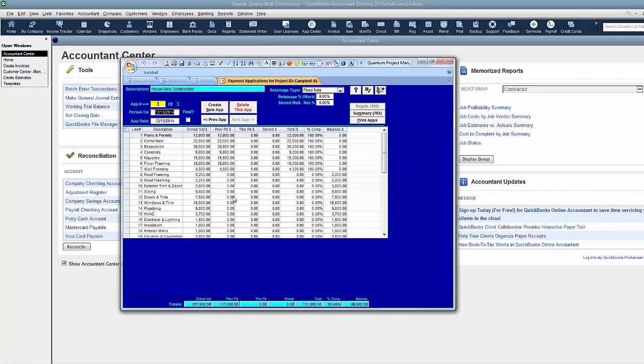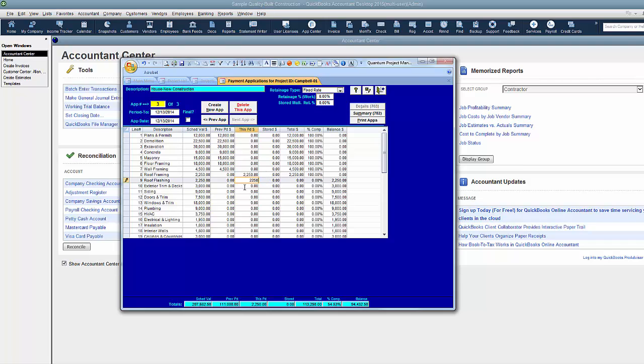And now it's asking me what we're paying in this application. So, let's say we're paying all of this one, all of this one, and maybe half of this one, and only $2,000 of this one. That's how much we've completed and that's what we're going to be billing in this particular application.